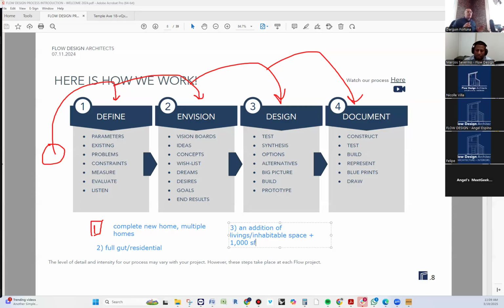And they're measuring it in different ways, but in our way, for Hertz rating purposes, it is the gross area that we care about. Exterior to exterior. If it is a new home, if it is over 1,000 square foot, if it is full gut, it will require a Hertz rater. Sometimes I put on my contract, it will likely require a Hertz rating.